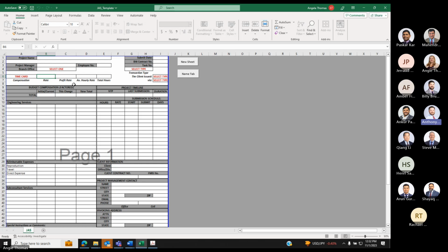The only instances where that's not necessarily true are contracts where we have low bid fixed hourly rates that we bill on a percentage basis. The rate might be a little low, but we should be scoping out the projects to obtain a certain fee to do the project. If you take a loaded rate and divide it by an actual rate, you can get your estimated factor.